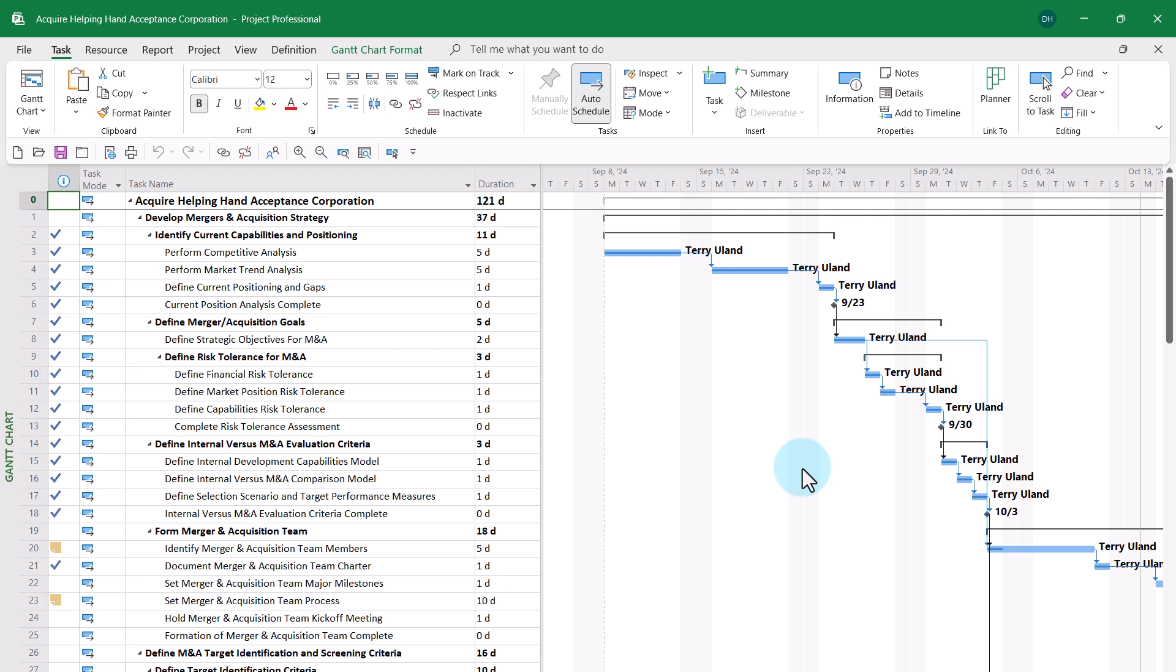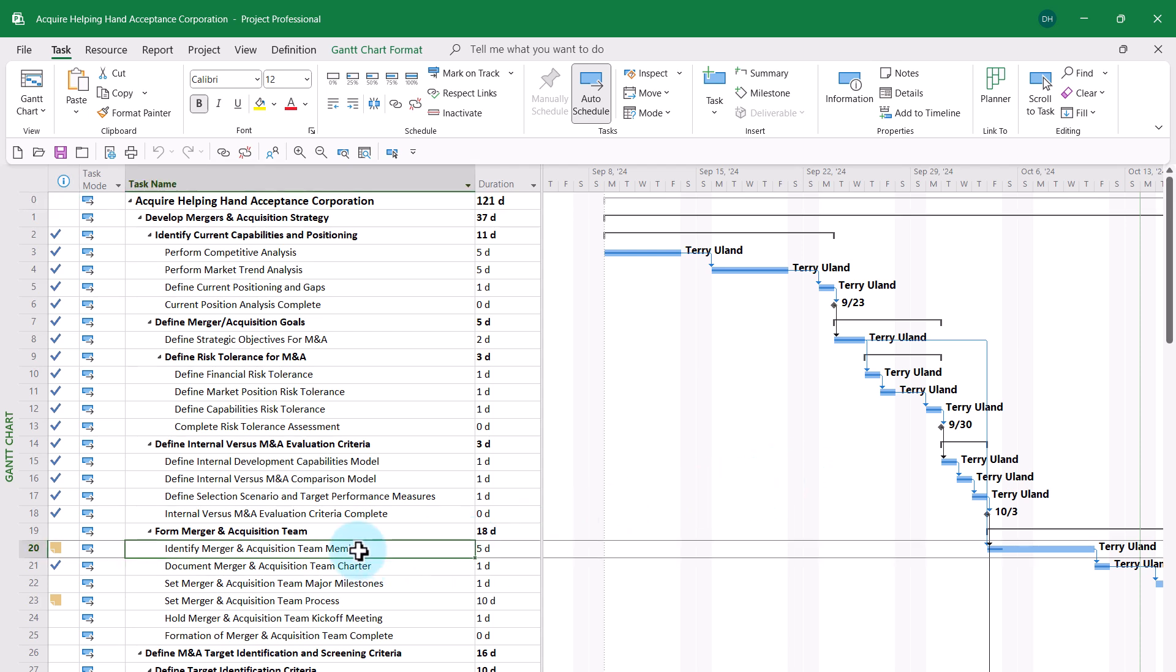While I'm working with Microsoft Project in offline mode, I can do almost anything that I can do in online mode. For example, these two tasks need to be marked as completed, so I'll select them and I'll click the 100% complete button in the task ribbon.